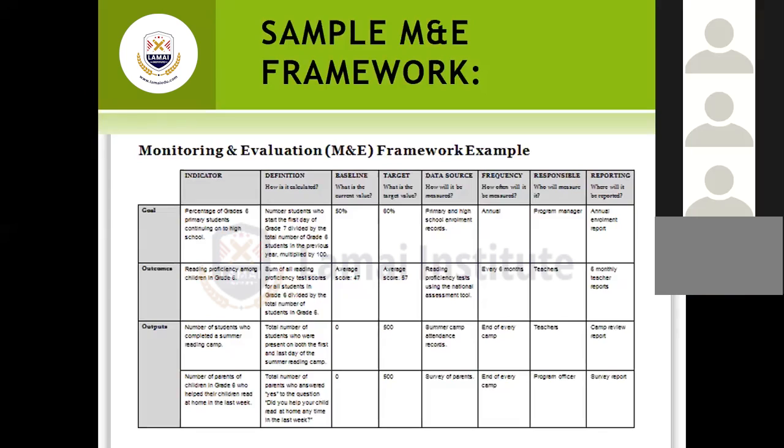Now, this is an actual populated M&E framework, and it shows us both the results and also how we will collect data, what the data sources will be, what the frequency will be, who will be responsible, and what the form of reporting will be. So I've also included this as a sample M&E framework for you to utilize in your learning as well.